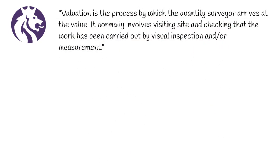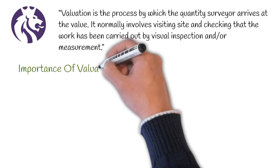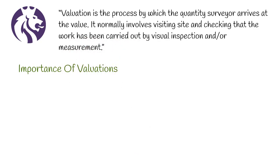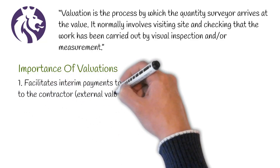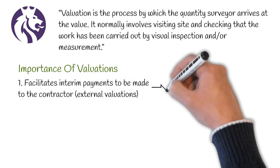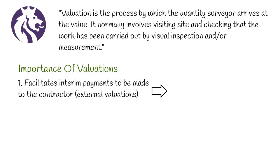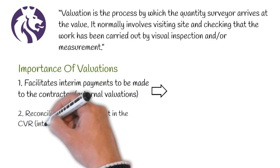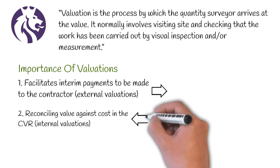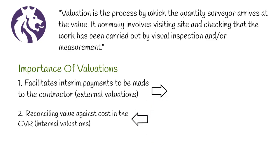The valuation of a construction project is important for many reasons. One of which is that it facilitates interim payments to be made to the contractor — these are known as external valuations. Another purpose is for reconciling value against cost in the CVR — these are known as internal valuations. In this video we'll be exploring external valuations.